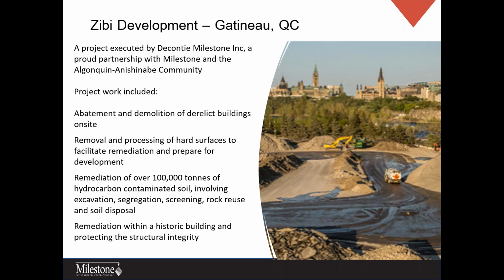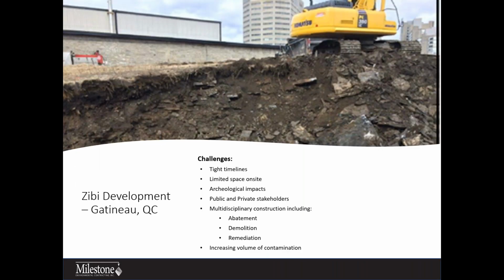The intent of the remediation is to incorporate a beneficial reuse of some of the materials during remediation, which involves screening of impacted material to salvage rock and crush the rock for reuse for the construction aspects of the development. As the remediation of the areas advanced, the development also advanced. This presented challenges with a constraining schedule and limited space to manage the contaminated soils, with competing use of property by other contractors and public and private stakeholders, while mitigating environmental impacts to the surrounding urban setting.